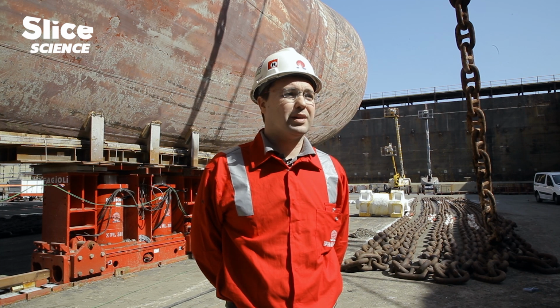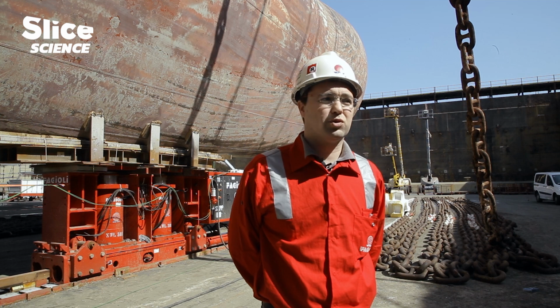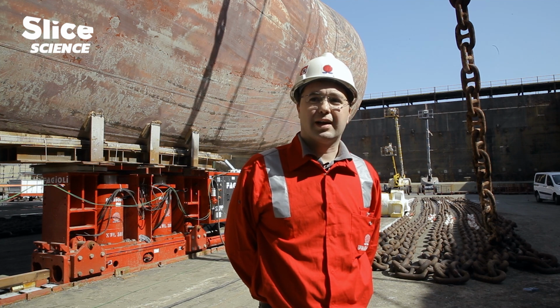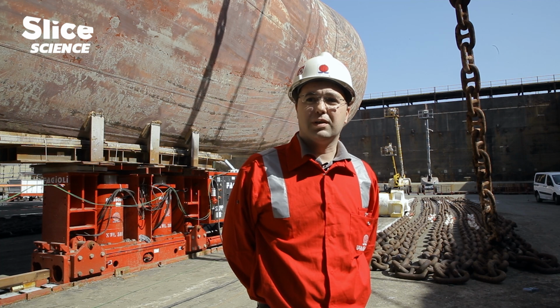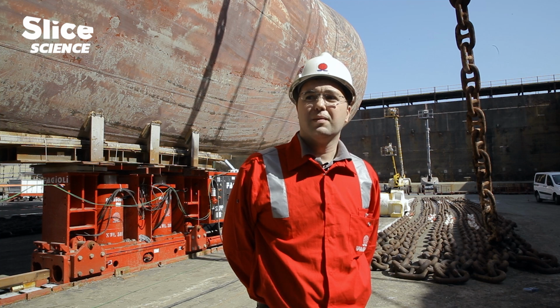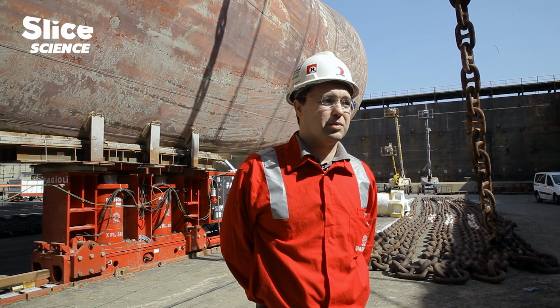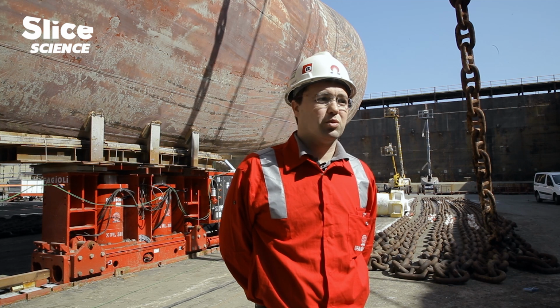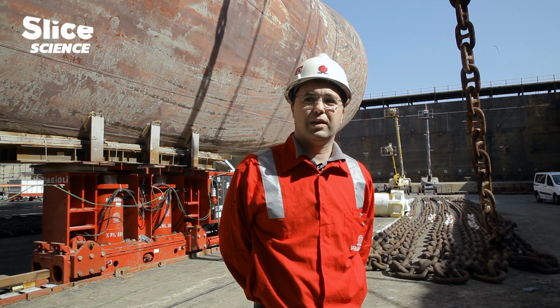One of those parts was then supported by the Fagioli skidding system that proceeded to move it 28 meters. This task was combined with another lifting system, the SPMTs, to insert the segment between the 2 extremities. Once this additional segment was added, the part of the ship that had been skidded 28 meters was then moved back.